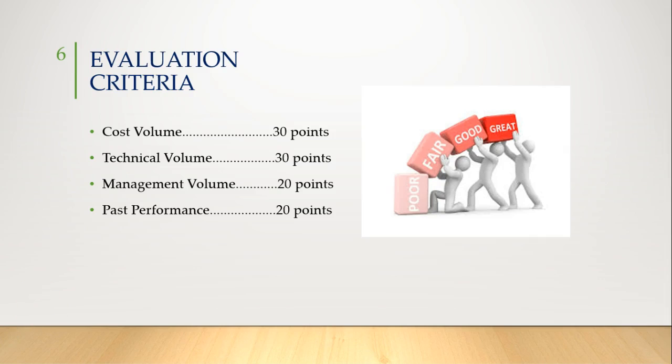Evaluation criteria. All proposals shall be reviewed and rated by MPS and the Translation Department Services key team members. Proposals might be disqualified if they are not received on time, if the proposal does not follow the format specified in this document, and if the format is not adequate for the key team members. MPS and the Translation Department Services reserve the right to make an award without providing further details.